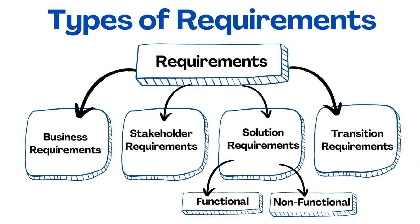The fourth requirement type is transition requirements, which refer to requirements needed to enable successful implementation of a project. These are short-period requirements — once completed, they no longer exist. As per BABOK, transition requirements describe capabilities the solution must have to facilitate transition from the current state to the future state, but which are not needed once the change is complete. Examples include: users must be trained to use the system effectively, or previous year's data must be migrated to the new system.